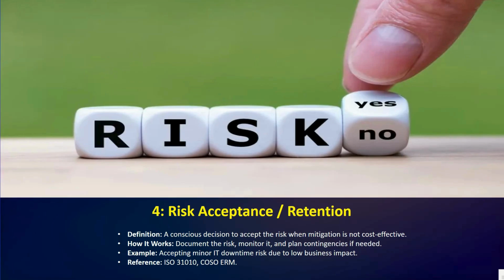Risk acceptance, also known as risk retention, is a deliberate strategy for risks where the cost of the treatment outweighs the potential impact. How it works: document the risk, monitor it, and plan a contingency if needed.